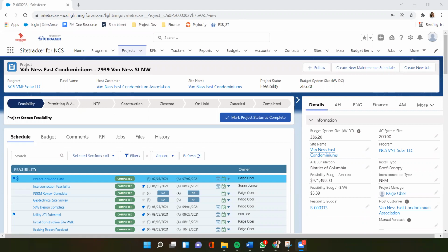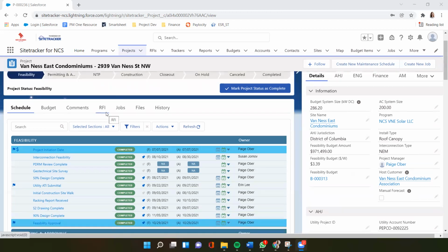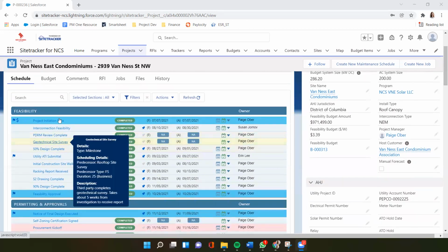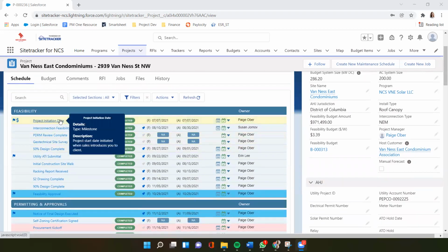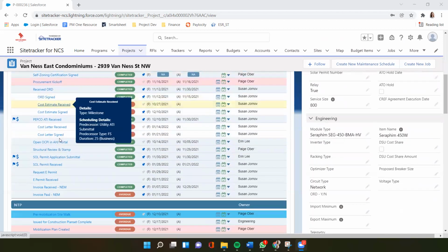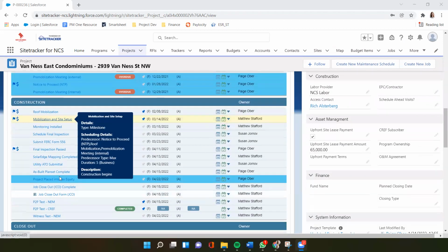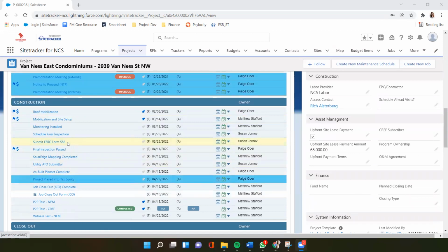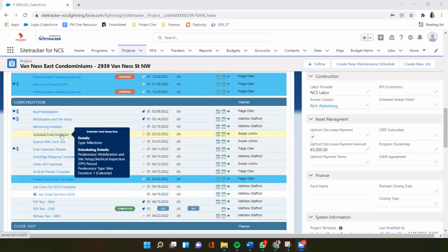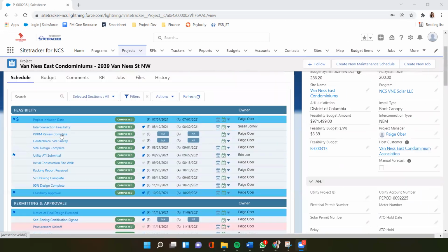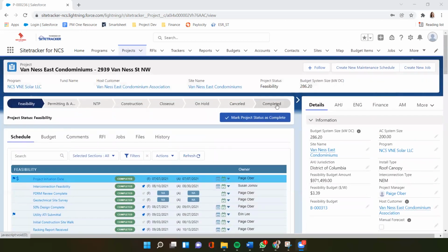You'll know that it's the project page because it'll say project up here and it'll have the name of the project along with this landing screen. All RFIs must be created off of an existing activity. The available activities upon which to create an RFI are listed in the schedule. Never create an RFI that is not directly linked to an activity. Otherwise, this will impact our ability to mark the project as completed once we get to the end. Just a little note there.